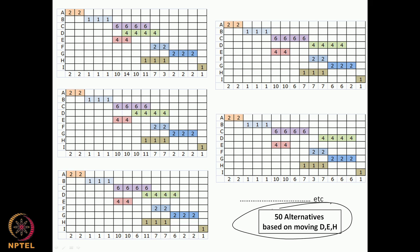So our solution space is about 50 possible options that have to be explored to find the best resource profile we can get. That is the flexibility we have with the current CPM network given the durations and relationships — we do not have any more alternatives. As we have several activities with float in a network, the alternatives will rapidly multiply. Even with 50 alternatives, it is possible to compute the resource profile for all 50 and then decide which profile we want.